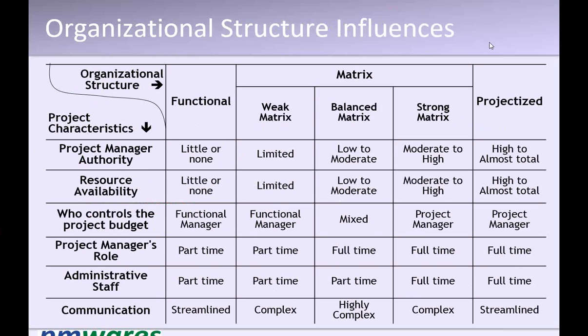When projects happen in a functional organization, people contribute to the project, but they stay here. They stay here, and from there they contribute to the project. But in the balanced matrix organization, the resources come here. They report to the project manager. Their reporting to the functional manager doesn't cease as such. They're reporting to both, so they have dual reporting. But in this case, their reporting here is not to a project manager. In fact, there is no project manager. The only project manager is a coordinator basically, who is the functional manager of the stream where the majority of the stake of the project exists.